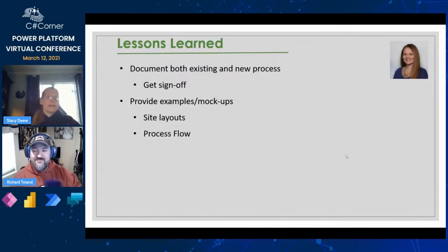So document, and we're going to show you some examples of some of them that we did. But when you're designing, don't always just document what your new process is, especially if no one really knows what the old one was. A lot of times we find that out and they're like, I don't really know, I just hand it to this person or whatever, right? Literally document what the current process is, and then your new one, so that you have a comparison. You have your improvement plan visually in front of you.